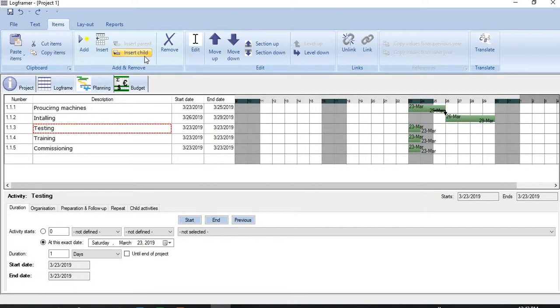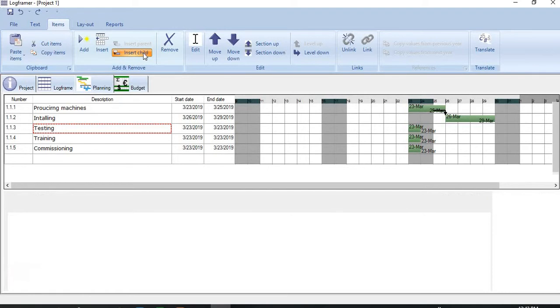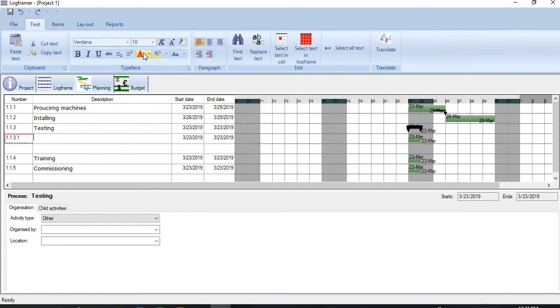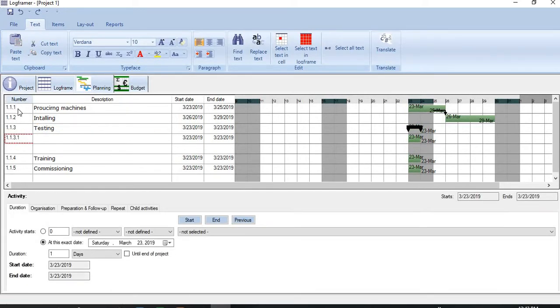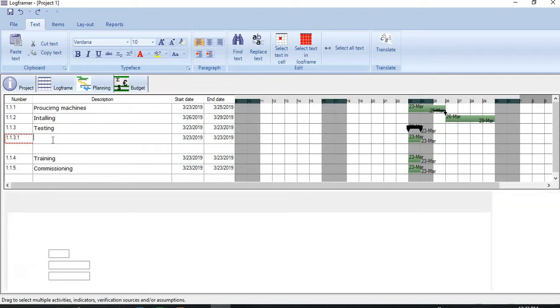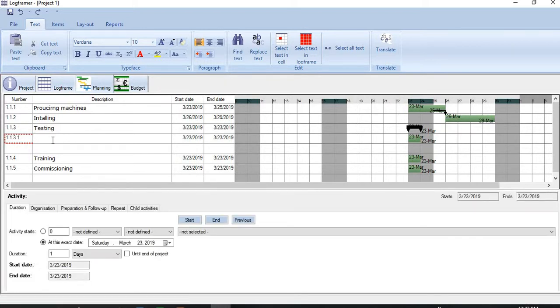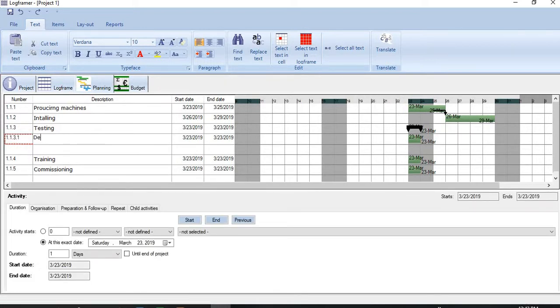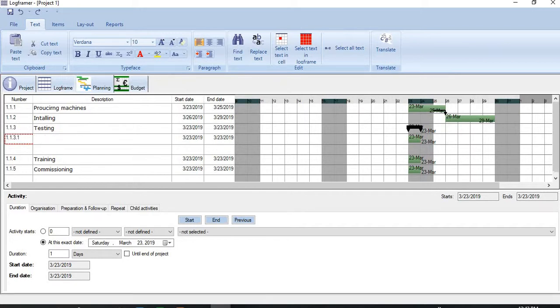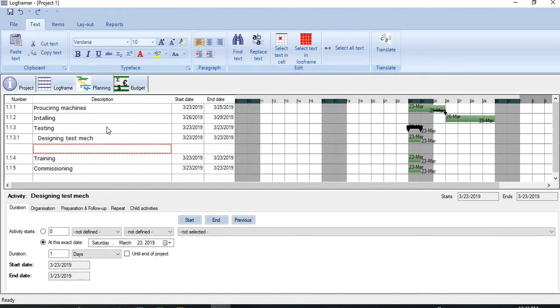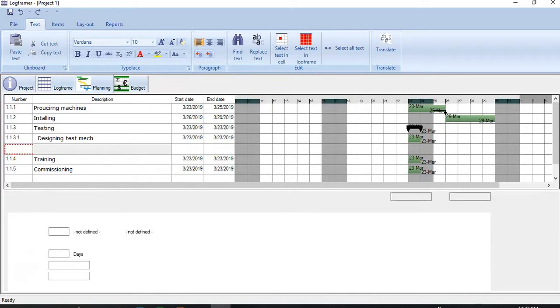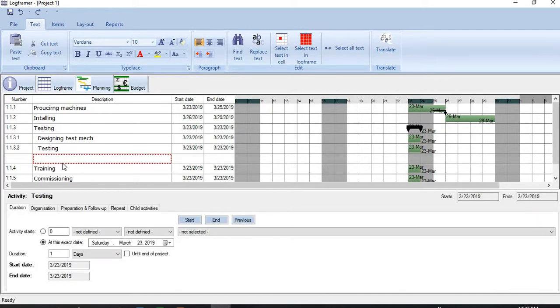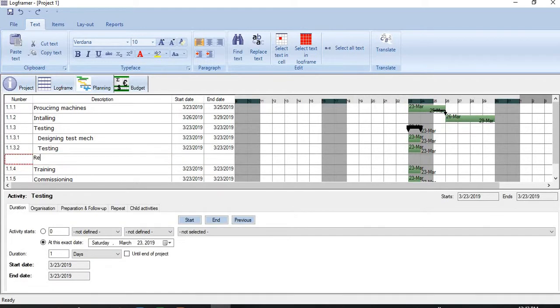This is used to create subordinate activities. Let me add a child here. You see a new activity has appeared. And these are the WBS codes, exactly the same code what we use in MS Project here. So for testing, the first one is designing test mechanism, then testing, and then reporting.